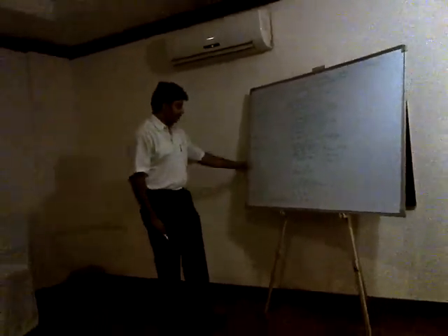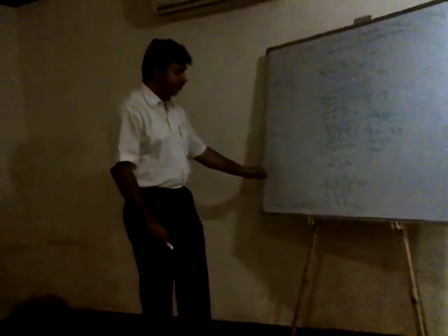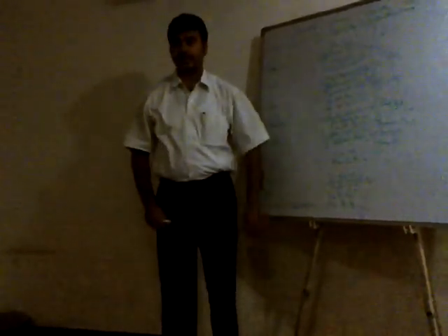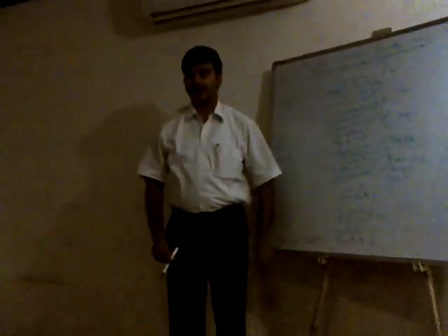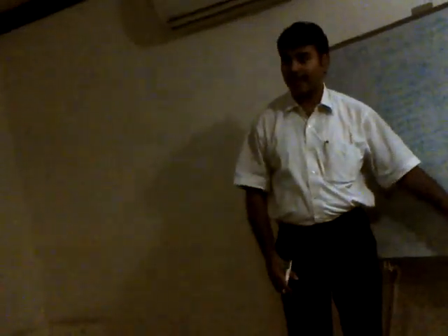Clear? Now, for communication, what was the process that we used? Did we have any process under executing for project communication management? Manage communication. Yes, excellent. Under risk, did we have any process? No. Under procurement, yes. What was the process? Conduct procurement. Conduct procurement was the process of selecting the vendor or seller and awarding the contract to the particular vendor or seller.